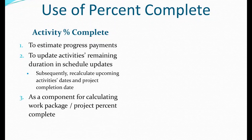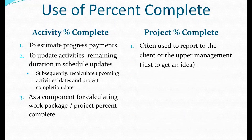We use activity percent complete as a component for calculating work package or project percent complete that includes this activity. For project percent complete, we usually use it to report to the client or upper management — for example, telling Mr. Smith that we are about 65 percent complete, just to give him an idea.